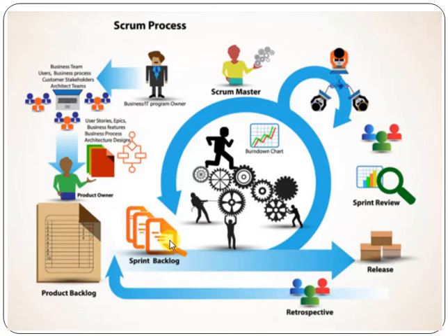After making the sprint backlog document, we start the sprint. Starting means that it is a 3 to 4 weeks time period, in which they are developing and testing, and during that period, daily Scrum meetings occur. Daily Scrum meeting means that on a daily basis, they discuss what we did yesterday, what we are going to do today, and what we are going to do tomorrow. It's just a 15 minute meeting, the daily Scrum meeting.